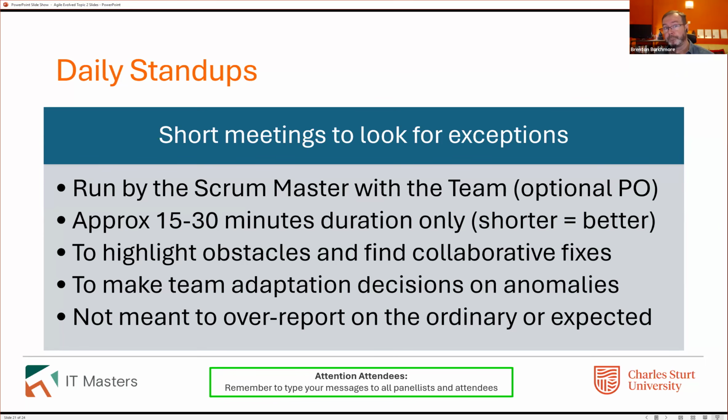They're welcome, but they're not pivotal. The Scrum Master absolutely has to be there, team member or not. It's meant to be 15 to 30 minutes. How do you keep it that short? Because it's only there for the exceptions, not for everything.